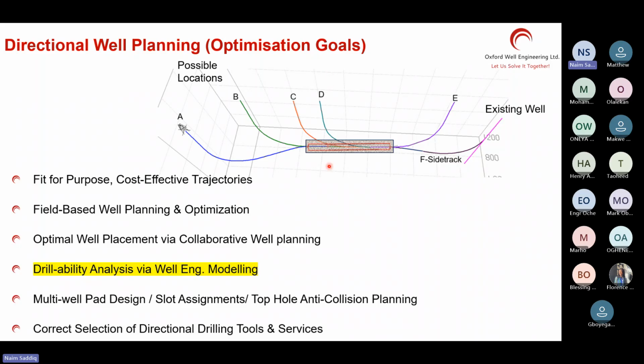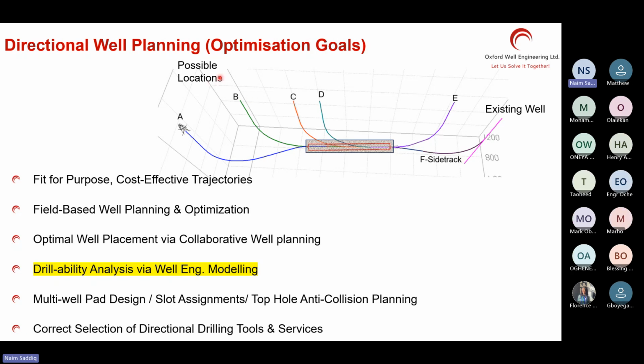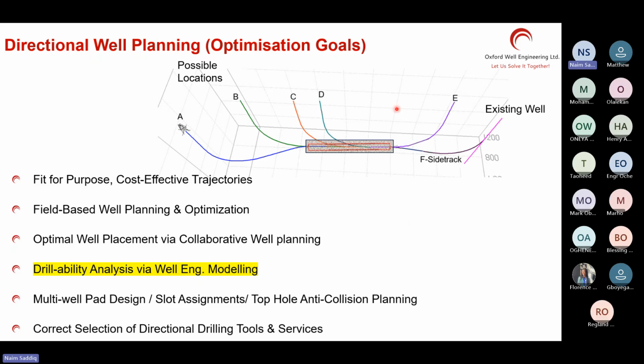For example, on onshore land rigs, some locations have schools, sometimes they have trees, some areas have protected water reservoirs and lakes. How could you know just by that? So you need to ask them which locations are not allowed, which are allowed, which area or zone you are allowed to find your location in, and can you come from these existing wells? Instead of drilling the full well, can you just sidetrack from an old well and hit the reservoir? Would that be acceptable? You could ask this question. That way you can do all kinds of options.